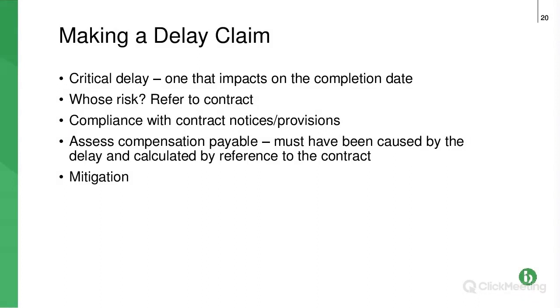Next stage, compliance with those contract notices. Don't forget that, because that can be an immediate debarring. It debars you from your extra time and your money if you haven't served the notice within the correct timescale and given the required information as per the contract.